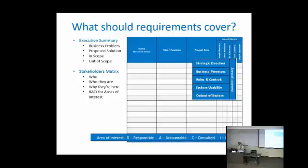Those areas of interest might include strategic direction, business processes. So one person might be, your project sponsor might be accountable for the strategic direction. The rest of us are just informed in the strategic direction. Your business lead might be accountable for the business processes.